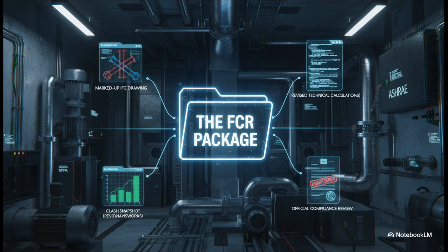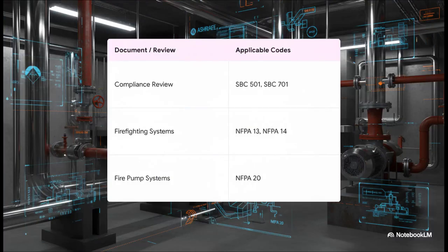Honestly, the number one mistake people make is submitting an incomplete package. That's the fastest way to get your FCR rejected and cause major delays. This isn't just paperwork, you guys. It's your case file. And this level of detail is what separates the pros from the amateurs.